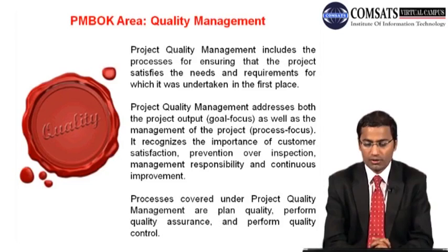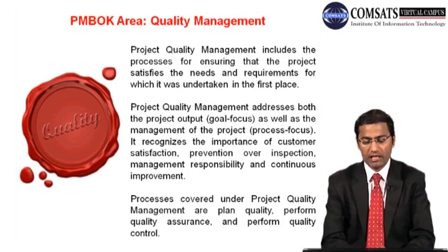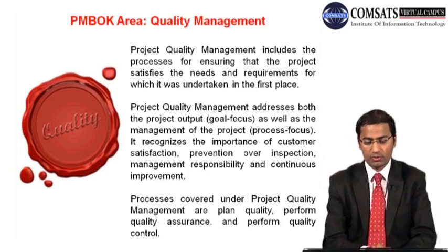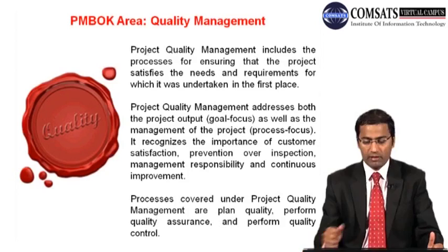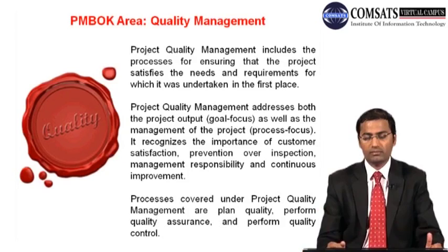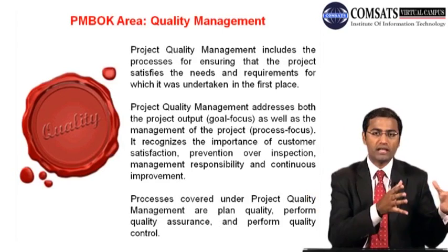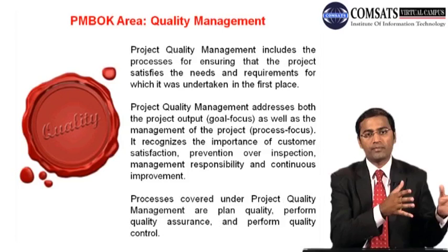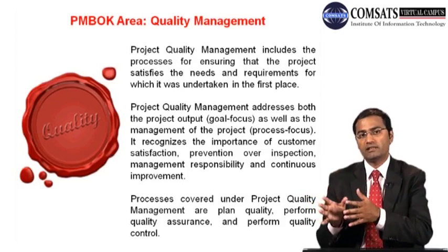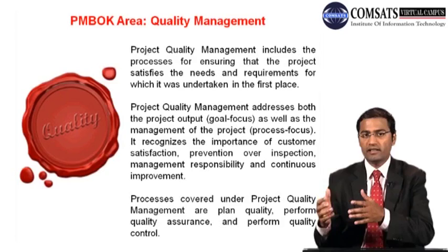And processes covered under project quality management are plan quality, perform quality assurance, and perform quality control. So many people get confused about quality assurance and quality control. So I give them one tip, and that is very handy. Quality assurance is about process, and quality control is about deliverables. So if you are working on a process and ensuring that the process is improving and following the set procedure, then you are performing quality assurance. And while you are inspecting the deliverables, and three deliverables are fine, and the fourth deliverable needs improvement, you are doing quality control.